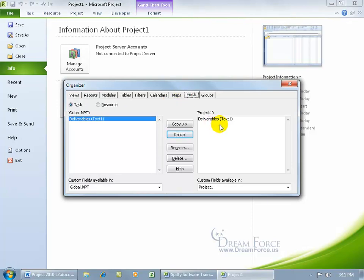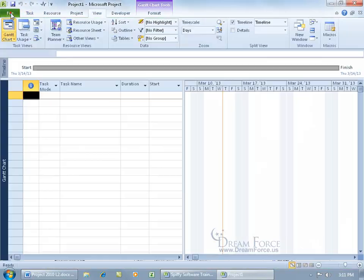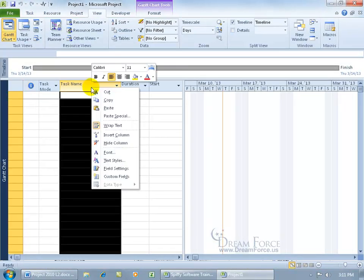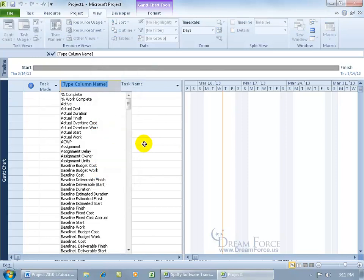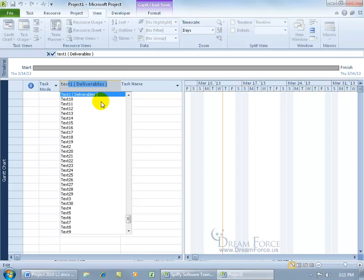You really want to find out if it's there. It shows that it's here, but it's Text 1. Click on the File tab to go back to the front stage. Right click on any column header, go down to Insert column. Type in the project name that it has for that custom field. Even though we call it Deliverables, the project name is Text 1, and hey, there it is. Sweet.